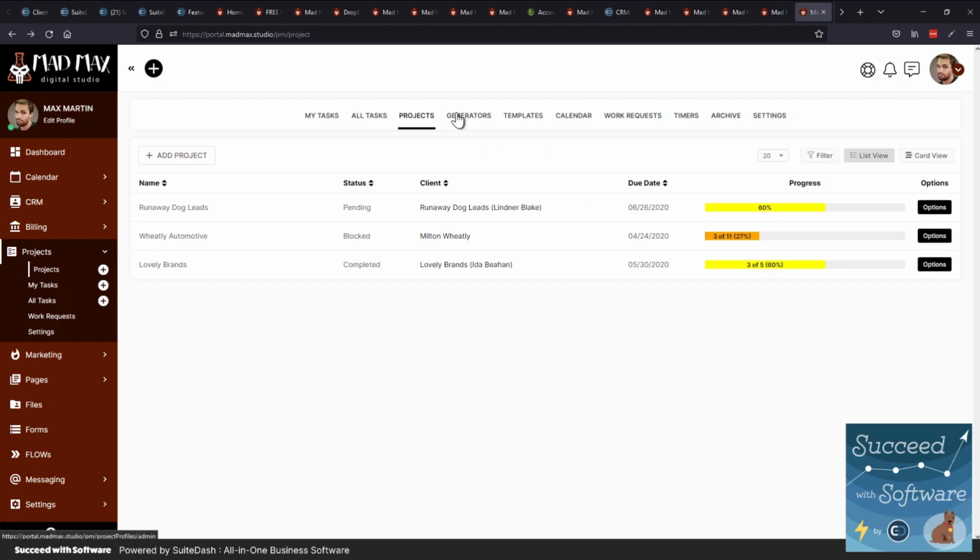Okay, so here we're looking at project generators. Same thing. So if I create a project generator, I'm defining all the elements, all the pieces and parts and data points of a project. I'm predefining, is a better way to say it. And then when, in an automation or via an intake form assignment or something like that, the project generator is told, okay, create a project, here's the data, this is the client, here's any other data that you need, and then boom, all the other stuff that was configured is taken into account, and you have a project created automatically based on your specifications, including options for recurring projects and date-based projects, etc., etc.